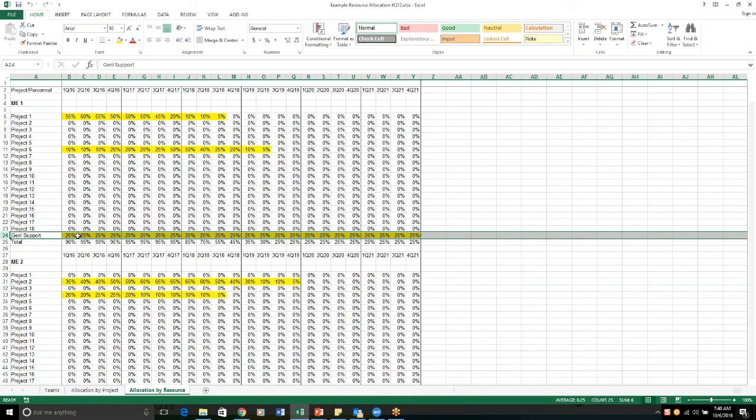And again, by doing some accounting, you start to get a feel, if on a weekly basis a person is telling you that they are spending half of their time on that kind of stuff, then it's very important in terms of what assumptions you're going to make on these projects. So it's a way to make that explicit in thinking about how much time people really have for value added.